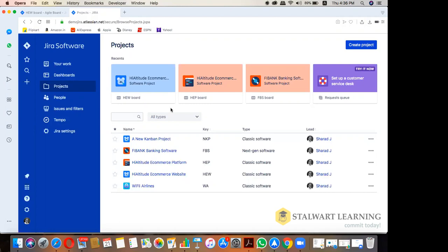But then it should not be exploited. Just because something is waiting from a product owner or an architect or a tech lead or a tester or anybody, or a customer even, it should not be put into blocked, because blocked means really blocked. You're not able to move. It's just a blocker there. You're held up. So you can have it that way.